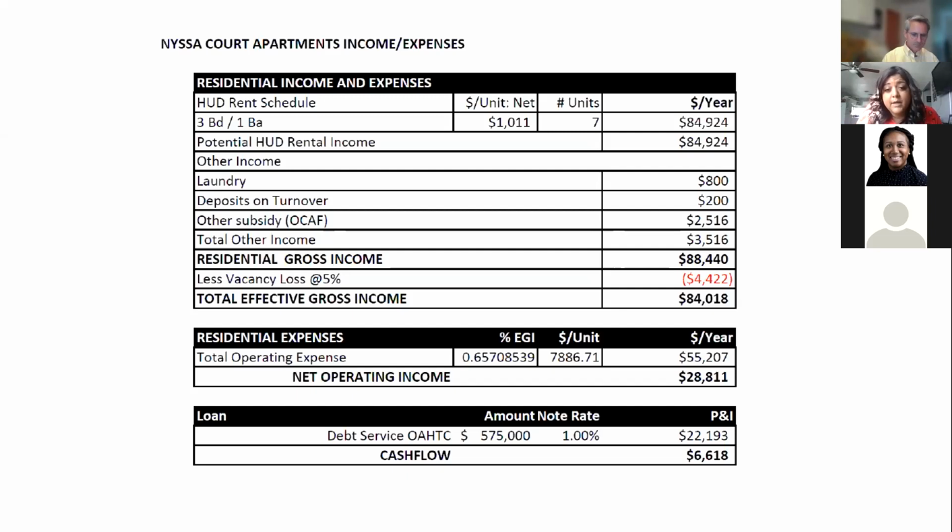So we had already approached NOAA, and NOAA had already informed us that they would be more than happy to assist us to give us that pre-development loan for $75,000, as the project was practically being given to us. So we decided to do the 2-step process where we would purchase the project and then apply for the preservation funds that came out a few months later.